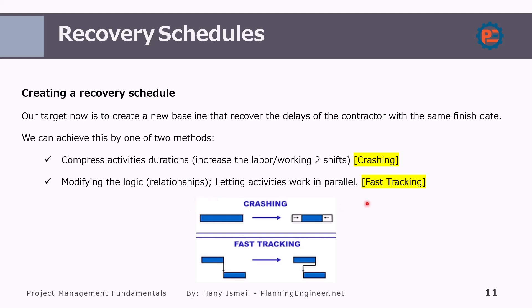Each methodology has its pros and cons. For example, crashing will increase costs because you will have some productivity loss when you compress the duration. You might also have some risk of idle manpower — for example, if you plan to finish the civil work in a shorter period and you have already mobilized the plastering team, they can have some idle days because the civil team didn't finish their work. On the other hand, fast tracking might increase risks because you might be working in the same area on different activities at the same time.